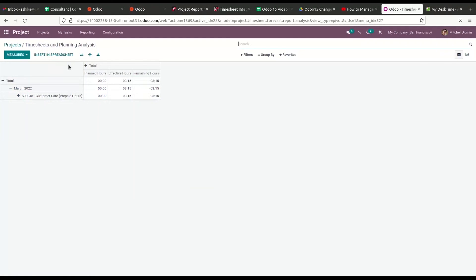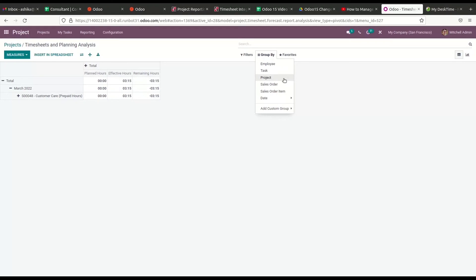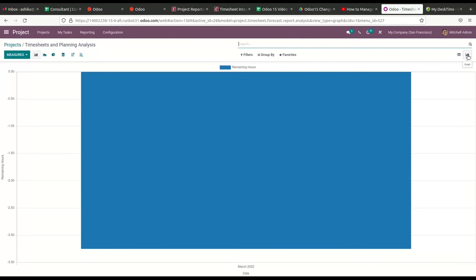This option allows you to examine the time spent by employees on the selected project. The pivot view of the reporting platform will show analytic data regarding the planned hours, effective hours, and the remaining hours to complete the project. Reports can be generated based on assigned employees, project, task, sales order, sales order item, date, and more. We can also use the graphical view to get line chart, bar chart, and pie chart options for the timesheet. The available filters and Group By options will help improve the reporting on this platform.